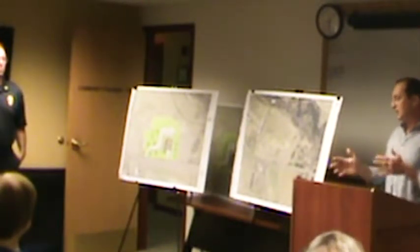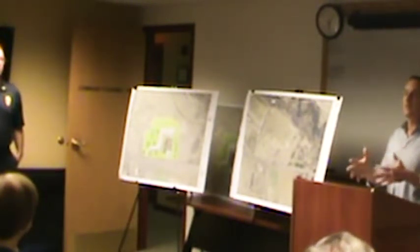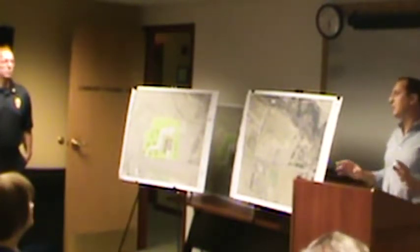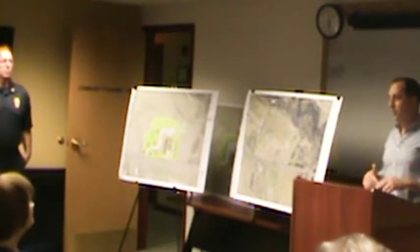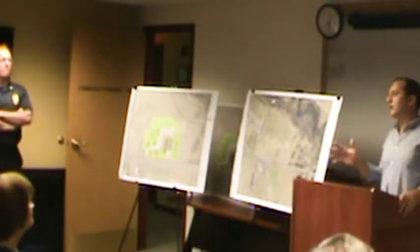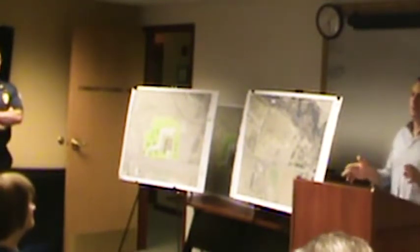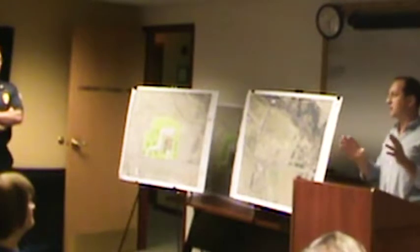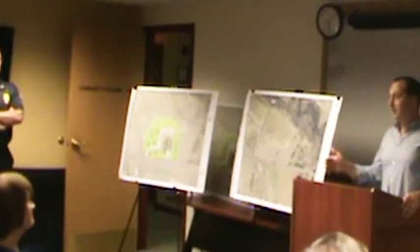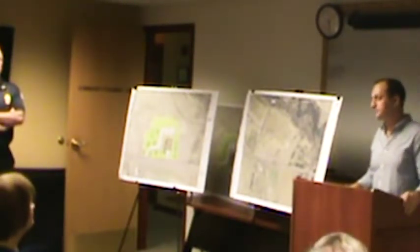We successfully got through that this past June. So we picked back up into the second phase of design, which we're currently in. We're anticipating being done with that phase mid-March, so in a couple weeks. Then we'll get into the final phase of design, which we anticipate going into mid-March of next year, and then rolling into bidding late March through April and early May of next year, hoping to break ground in June of next year, and hoping to occupy by July, August of 2020.